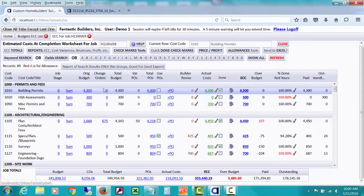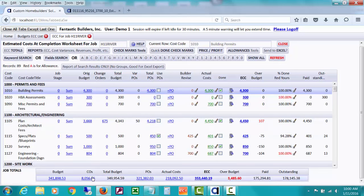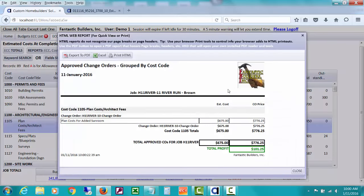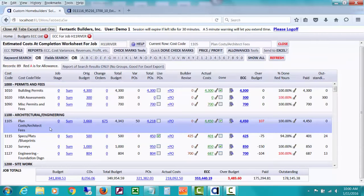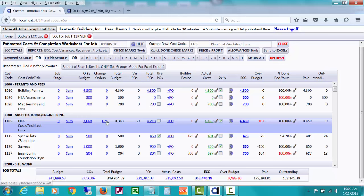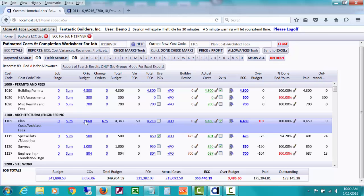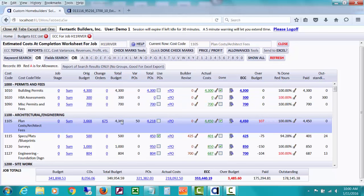Now, the second column over is for the estimated costs of any change orders that you've posted. You'll see a total of all those here. This is your cost, not the home buyer's cost. You can drill down, see what you estimated the cost to be, what the price is, and what the total profit is. If there was more than one change order for that particular cost code, plan costs, architect fees, you would see that there. The next column over adds those two together, the original budget plus estimated cost of change orders, to come up with basically what I would call a revised budget.